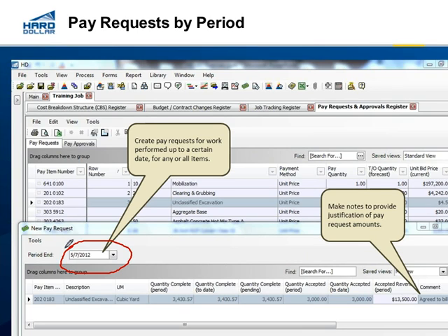Well, this is where you can specify for the month of May of 2012, when do you want to stop with that progress payment. So in this case, we're stopping at May 7th, right? We might have entries all the way up to May 31st, but as far as this payment is concerned, we're only taking progress up to May 7th. So that was not previously possible in version 11.